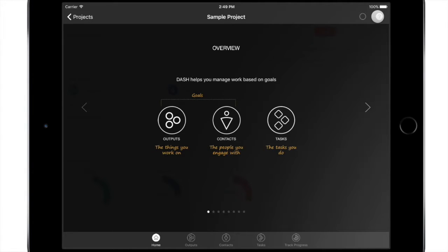The main principle of Agile working is to have a project rhythm, so you plan and complete work in repeating periods. So every Monday you might plan all the tasks you're going to do by the end of the week, and then repeat this every week.